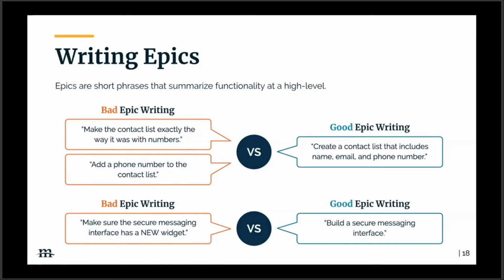Yeah, that's a great point. Thanks for bringing that up, Josh. The product owner, who will likely be you, is in the process of writing epics, and as you're going through that process, make sure that you're not duplicating epics across different features and functionality. We see that oftentimes in really big projects, and it can be confusing when you're going to stakeholders and getting buy-in, and we'll talk about that in a moment. So you want to make sure that all epics contain at least one action verb in the title, and that action, like Josh said, focuses on what needs to be accomplished.